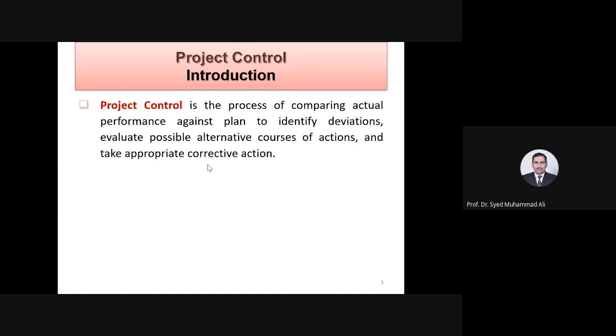Okay, let's move. So baseline is the original plan which you made, you finalized, then you spoke with your client, you spoke with the stakeholders, everybody agreed that this project plan is perfect to start. So you freeze that, you fix that, you set it as a baseline. So the original final plan, according to which now you are moving, actually you have to have some project plan. So that plan which you are going to follow is the baseline.